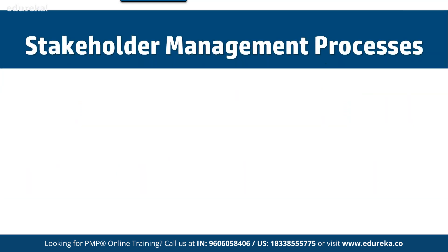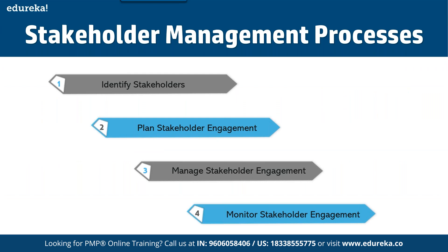Now, the stakeholder management process is divided into four different categories. One is identify stakeholders. Two is plan stakeholder management. Three, once you have onboarded those stakeholders and planned the management, you have to manage that properly using different tools and processes for easy management. The last one is monitoring — keeping an eye that people are following the defined principles, roles, and privileges.